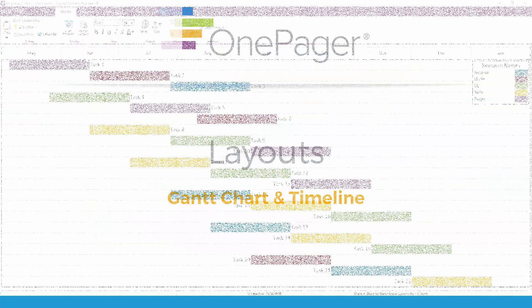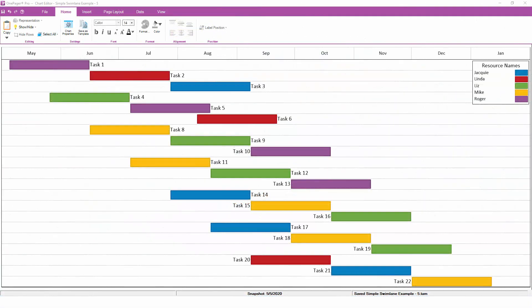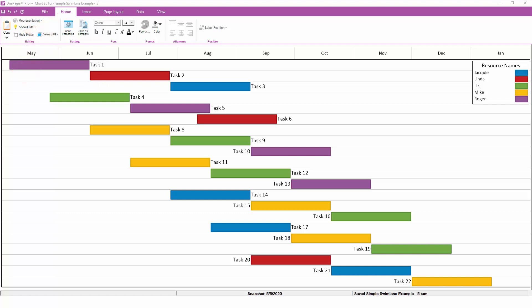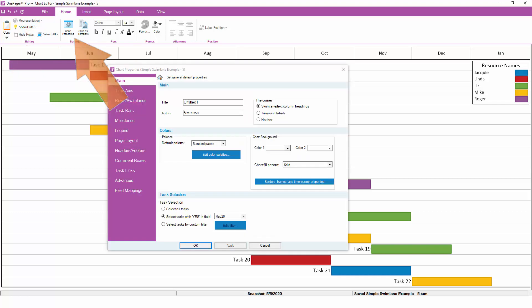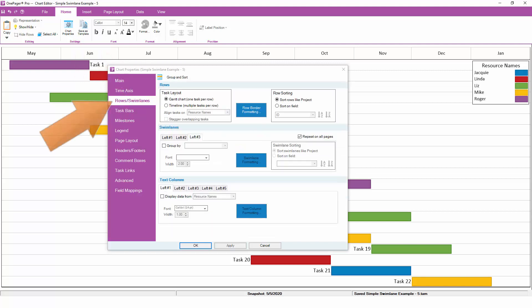To begin, we'll look at the different layout options that OnePager offers. Most of the time, users either want a timeline layout or a Gantt chart layout. All of your different row and swimlane options can be set up by going to the Home tab, then to the Chart Properties button, and then to the Rows and Swimlanes tab.